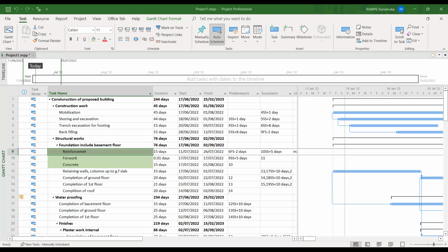If you say grade 30 concrete, we know that the ratio is 1:1:2. If your ratio is 1:1:2, then 1/4 is for cement, 1/4 is for sand, and 2/4 is for metal, and then we can easily calculate. Also if you have the bulking factor or shrinkage, for the cement areas we can add the shrinkage, and we can easily take the quantities. So for this example, for the concrete, we have to identify how many cement bags are needed.